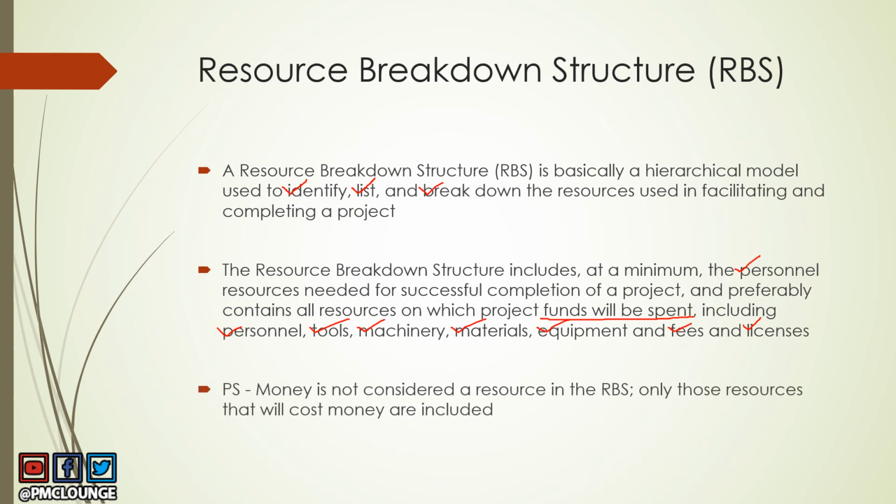Now, an important thing to note here is money is not considered a resource in the RBS, right? So only those resources that will cost money are included, but money in itself is not an entry that you will see in your resource breakdown structure. Now let's look at an example of RBS.